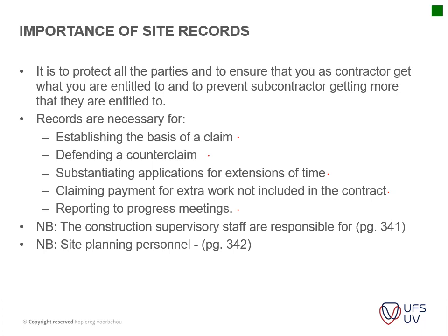So your supervisory staff is important or responsible for maintaining your daily diary, recording time lost per day due to exceptional rain, cold, keeping records of contractor laborers, his subcontractors, recording verbal instructions from the architect or his clerk of works, and additional excavation works, etc. Issue of drawings, material received, recorded, and then your day work records.